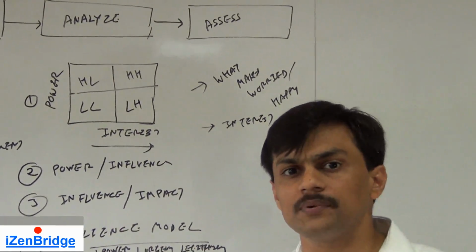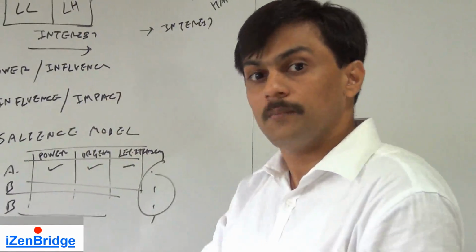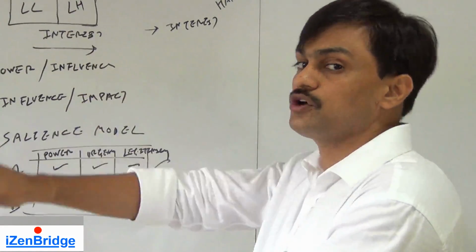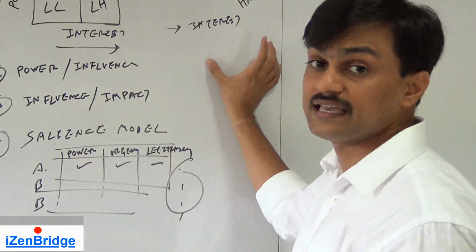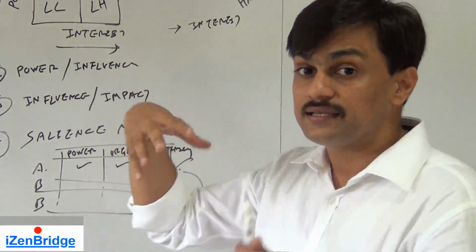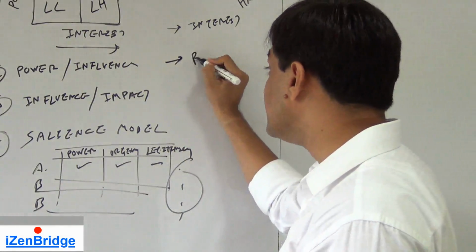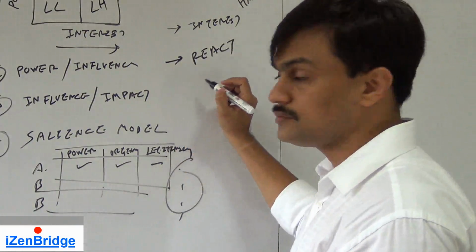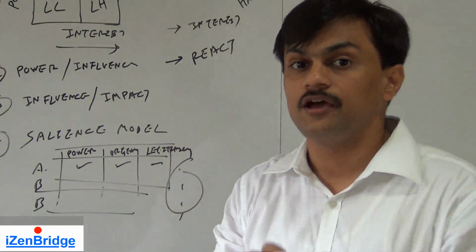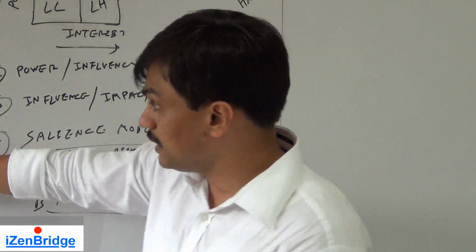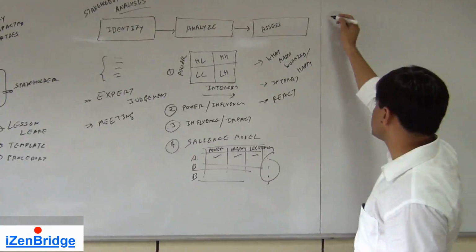For example, there could be one person who is from a technical background, and since he is managing a managerial role, even though he is a functional manager of a different function, because of his technical background he may always remain interested in the technical area of your project. So we try to identify the area of interest of those stakeholders. We also try to identify how they will react to a given situation. Now, these assessments are primarily done by the project manager and selected individuals in the form of meetings and expert judgment, and this is finally recorded as a stakeholder register.